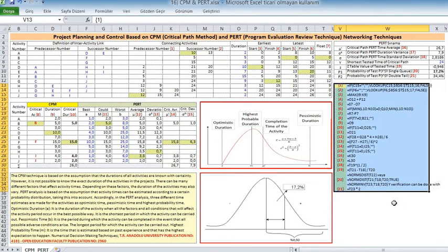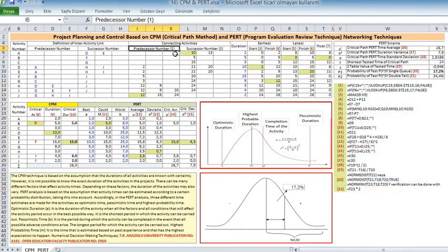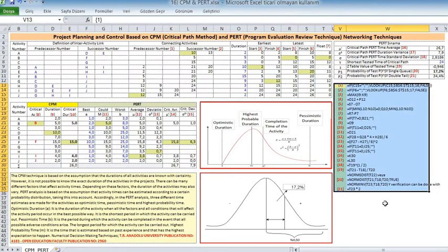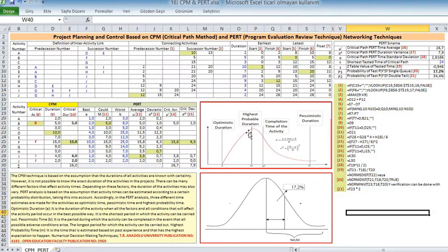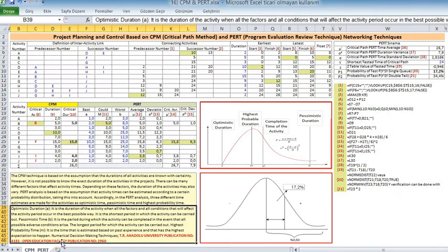technique, PERT, is appropriate for the projects where the time needed to complete different activities are not known. On the other hand, the critical path method or CPM is apt for the projects which are recurring in nature. The two scheduling methods use a common approach for designing the network and for ascertaining its critical path. They are used in the successful completion of a project and hence used in conjunction with each other. Nevertheless, the truth is that CPM is different from PERT in a way that the latter concentrates on time while the former stresses on the time-cost trade-off.